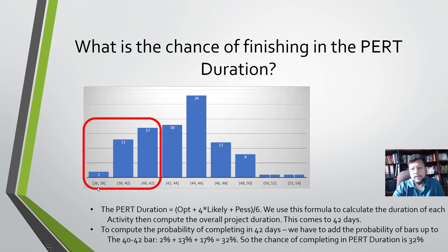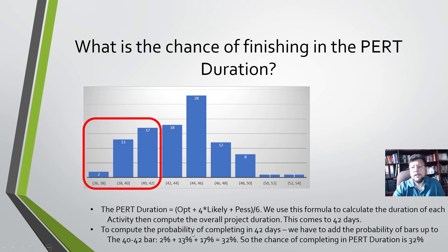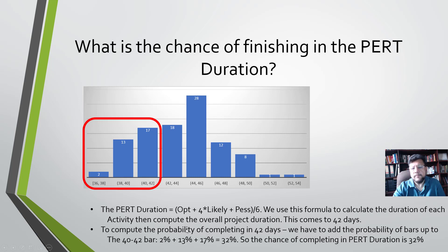So we add all three of these bars and we get 32 percent. That means there's a 32 percent chance that the project will finish within 42 days.